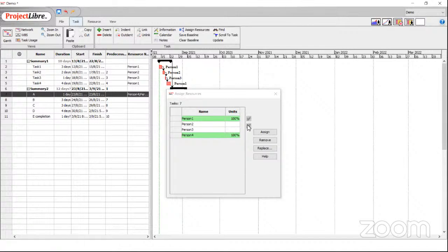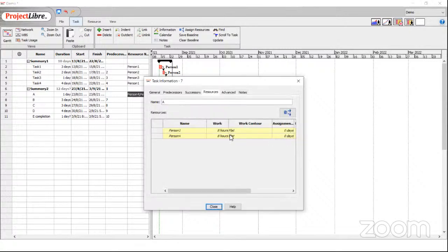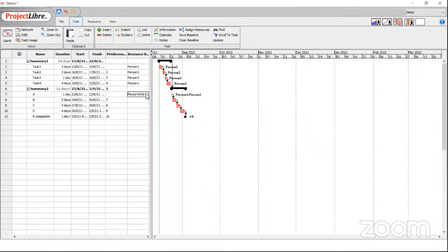So you mean it is changing the time plan? Exactly, just because you added the number of people. You said double the number of people, so therefore it becomes faster. Exactly. So it takes a very mathematical view of things, which works in a situation where somebody is doing software development, but doesn't work for us.